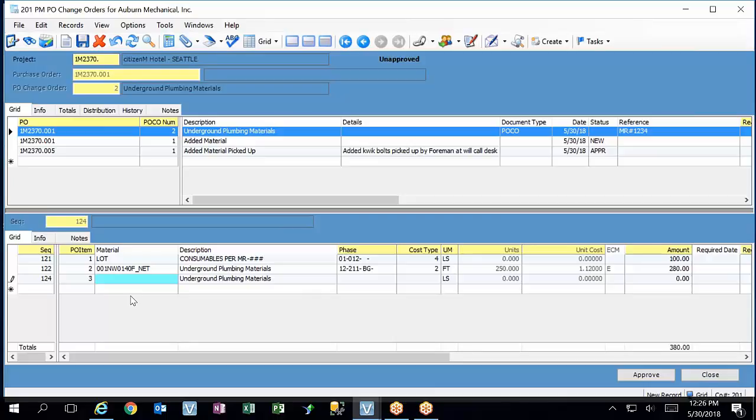But you're saying if I did the change order and I got the money in another phase, yeah, I wouldn't do any budget adjusting in here between phases. It'll make it complicated. In theory, though, then when we're totally billed out, these phase codes here will respectively overrun by 100 and 280, and the phase code that we have for our new change order will underrun by 380.